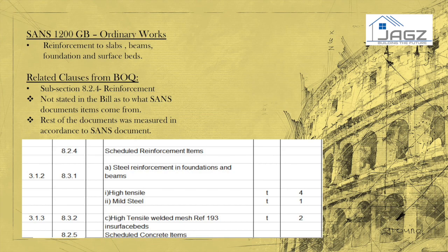The mass of square and round steel bars shall have a diameter and be measured separately. No allowance shall be made for cutting waste, base devices, or binding wire. Concerning high tensile welded mesh, the reference shall be stated in the definition.